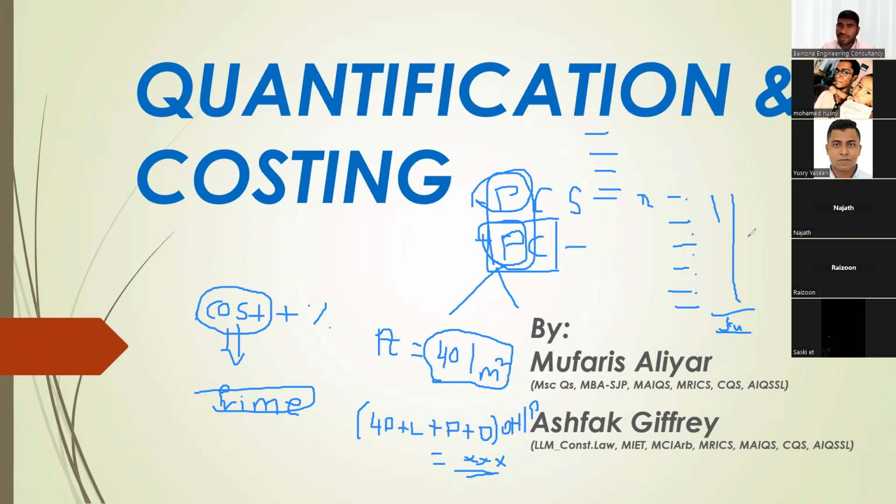If you say that I need a fridge and I need this size and give some kind of short information, he cannot give you a price. He will suggest many fridges. So you have to give him precise details of your requirements. Then only he can give you the exact material. So that is the reason in the contract we give a specification. That is one point, that contractors can print it out and go to the shop and show that this is the material specification. This is the thickness of it. This is the chemical property. This is the property of water consumption, or whatever it is. You have to show it to him.